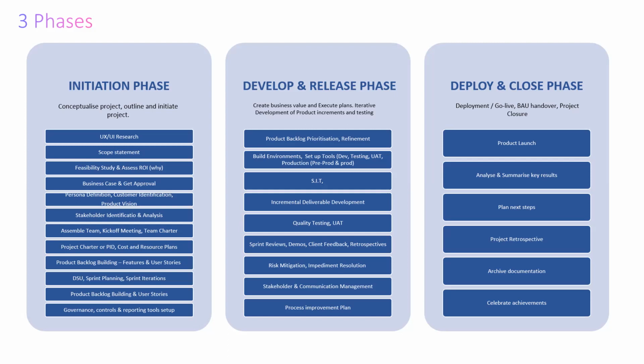You have to be testing as you're going on. Each one, okay. That's the difference between Agile and Waterfall. Waterfall will wait till the end. We don't do that in Agile. You will be testing as you're going on. Every sprint, you test to be sure you haven't broken anything.